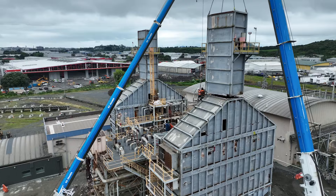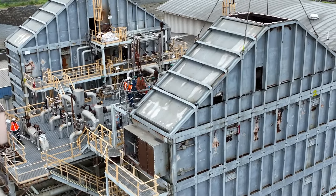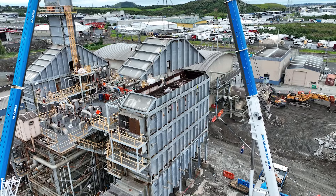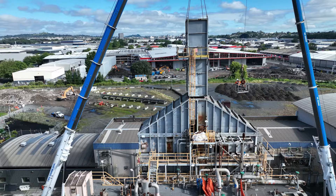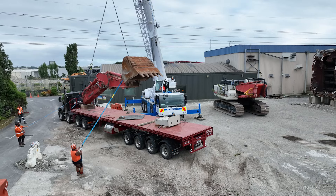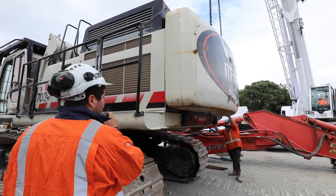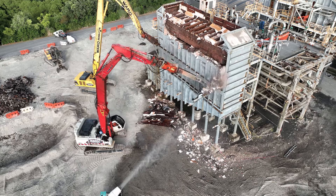We craned the top two sections of the boilers. The top piece weighed 17 tonnes and the bottom was 13. Our 70 tonne long-reach high reach was brought in to remove the six Incanal bundles, each weighing roughly 80 tonnes.